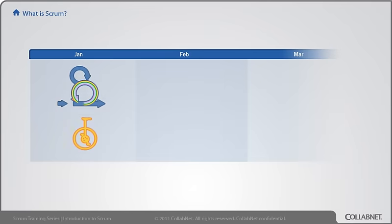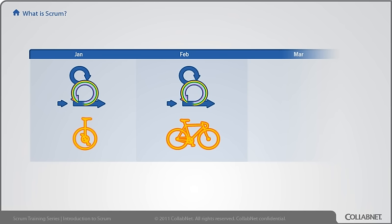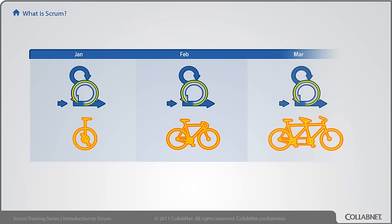Right from the first sprint, a Scrum team tries to build a working, tested, potentially shippable product increment, even if it starts out small. Every sprint they demonstrate what little bit of shippable product they have to everyone. Customers often need to see the wrong product before they can specify what they really need. With short iterations and more feedback, we have a better chance of discovering the right product. While the product owner doesn't have to ship every sprint, it's the team's job to make it possible.